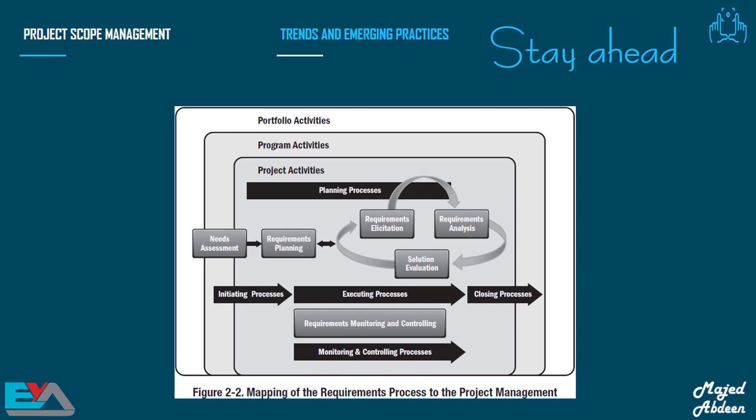Business analysis may well begin before the project is initiated and the project manager is assigned. When a business analyst is assigned to a project, according to the PMBOK, the activities related to requirements are their responsibility, while the project manager is responsible for ensuring the requirements-related work is accounted for in the project management plan, and that requirements-related activities are performed on time, within budget, and deliver value.